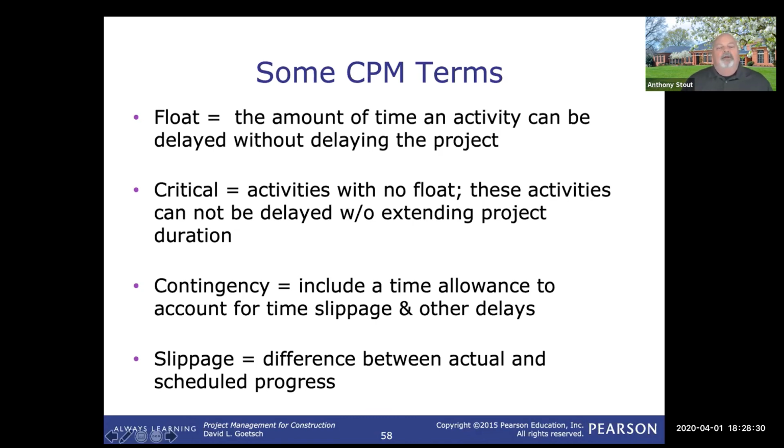And then a lot of times we'll plan for contingency. And contingency may be planned slack that we would put in a schedule based on understanding what may occur. If I'm doing construction projects in July, I may have very little slack that I would plan in the construction project. If I'm doing it in February, then I may plan longer durations, and I may actually plan some slack in there to be able to account for snow days and things like that.